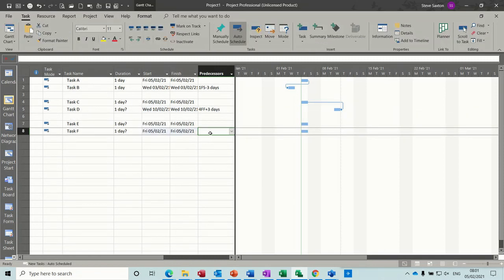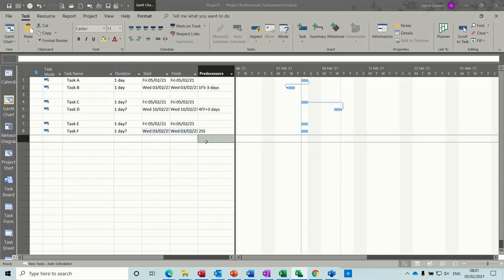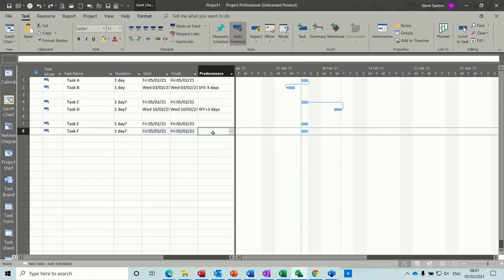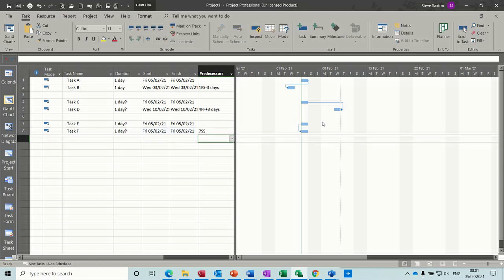So if I do on this one, 7SS. That's a start to start link. So this task dictates when that one can start.